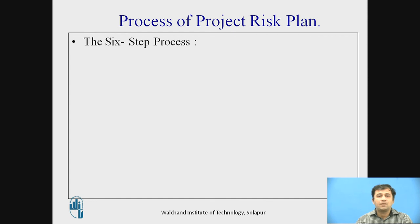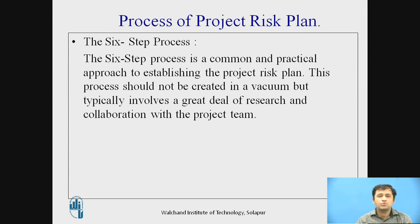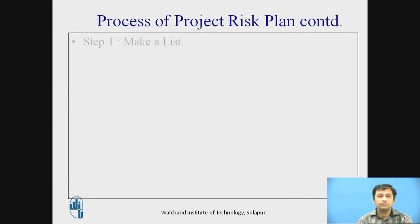There are generally six steps followed for risk planning. The six-step process is a common and practical approach to establishing the project risk plan. This process should not be created in a vacuum and typically involves a great deal of research and collaboration within the project team — including not only team members working on the project, but also stakeholders, the outside world, and vendors. The first step is to make a list of all possible risks involved and at what stage each risk is going to occur.